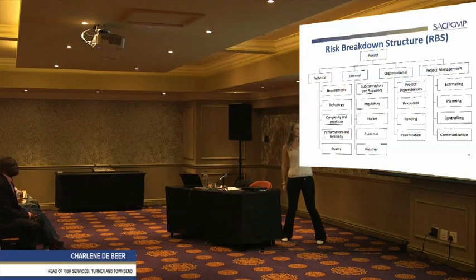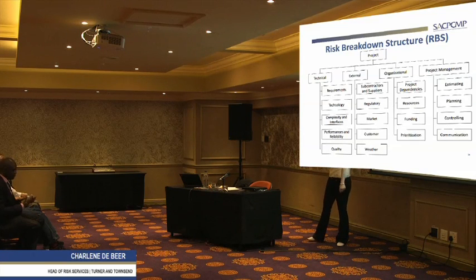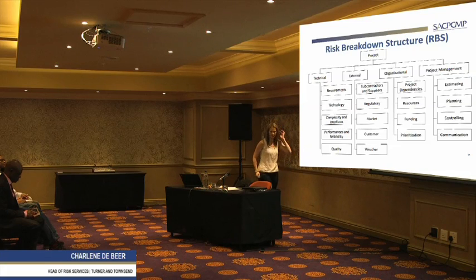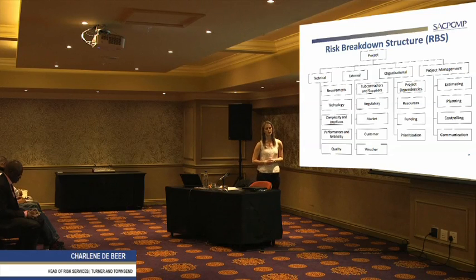So you'll basically just tell the guys, in the project we've got technical, external, organizational, and PM categories, and under them, these could be the various risks that we might face. So for example, external, we've got subcontractors and suppliers and vendors on site, so sometimes we're dependent on them for project delivery, so what other risks are there? And within those areas, I can promise you the guys will be able to give you more than 3 risks. So give them the risk breakdown structure and give them all an opportunity to at least voice what their concerns are.